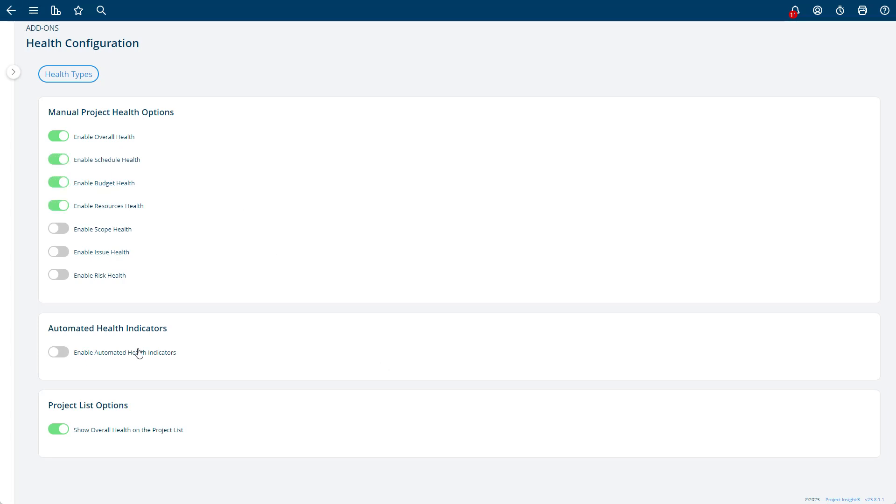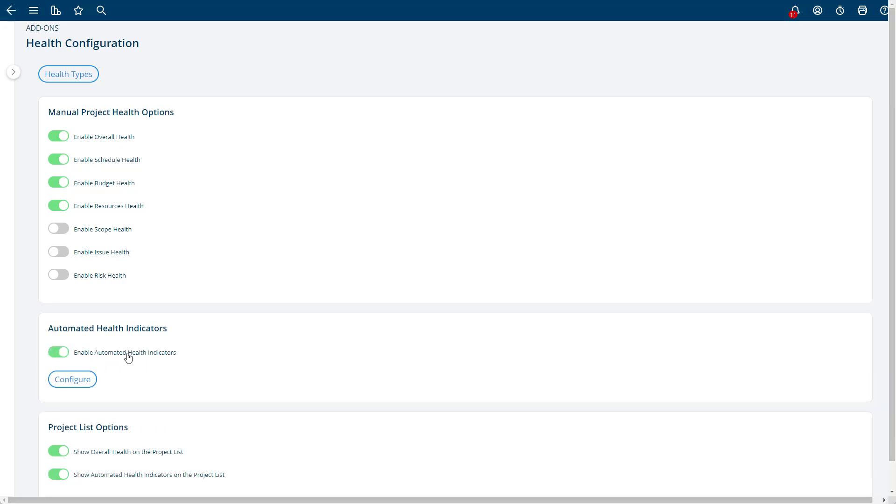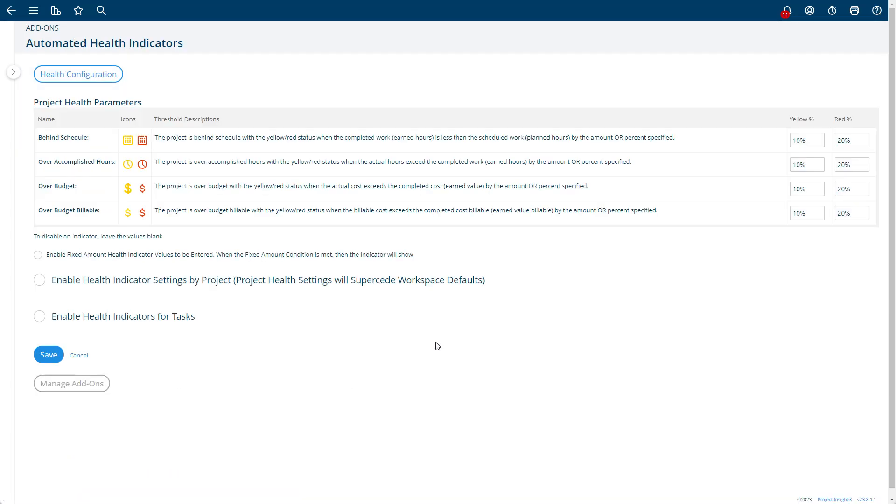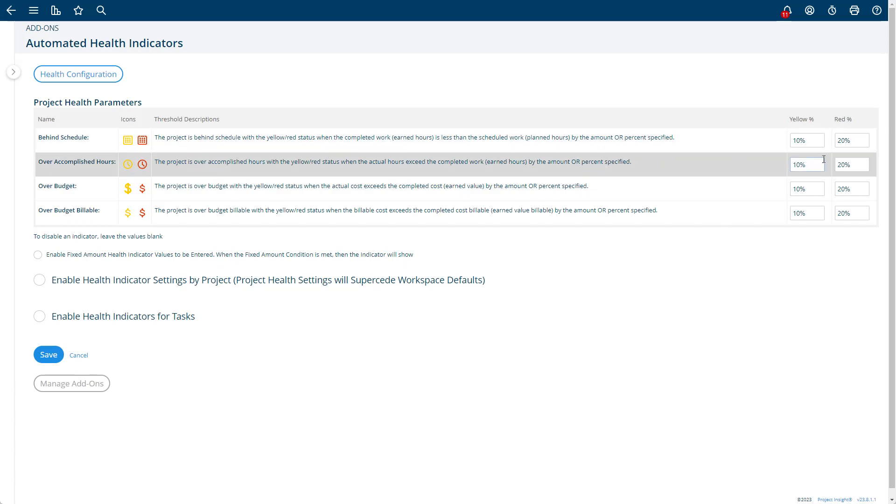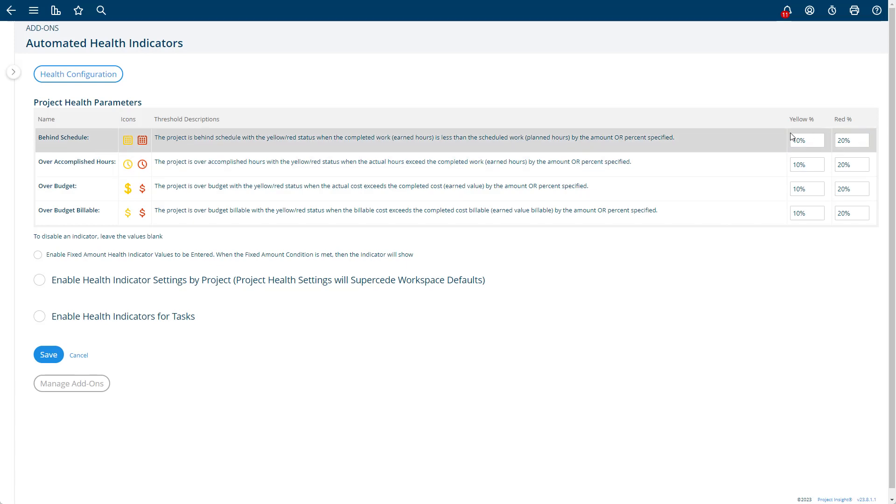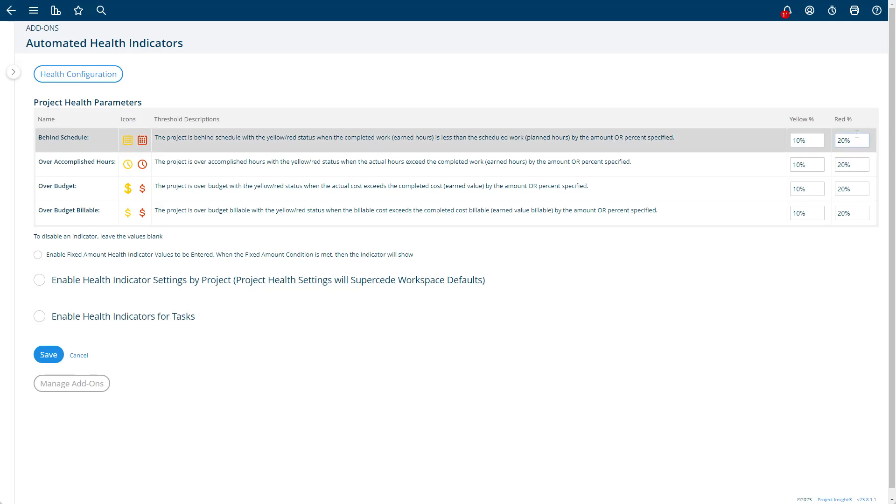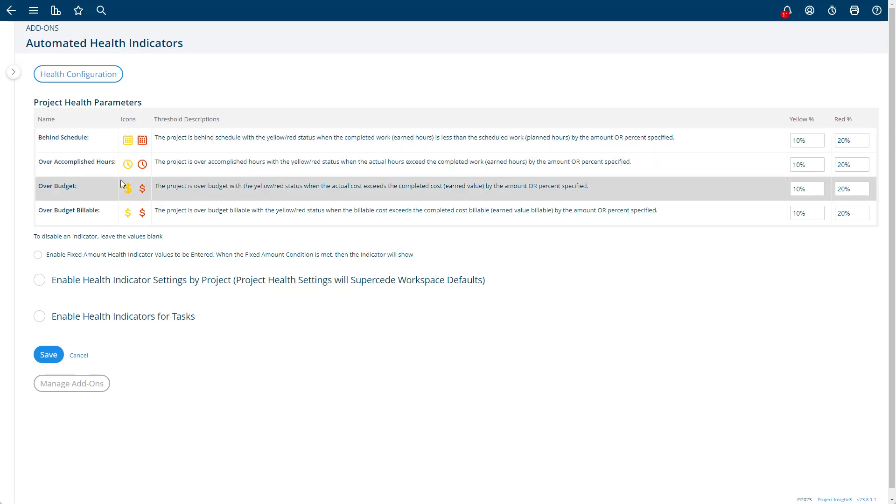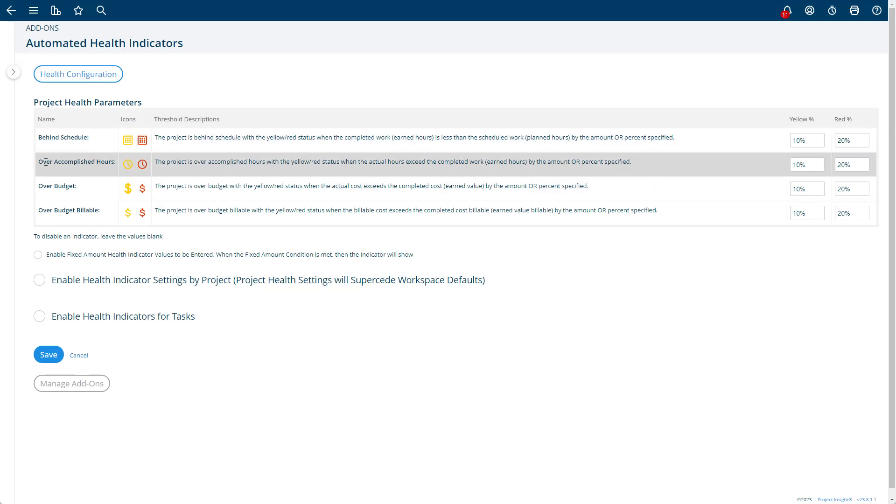The other option here is enable automated health indicators. What that does is, if you have these on, you can configure automated health indicators to say that when a project is behind schedule by 10%, it's yellow, or 20%, it's red. If it's over-accomplished hours, that means your actual hours exceeds what you've completed by 10 or 20%, it could be yellow.